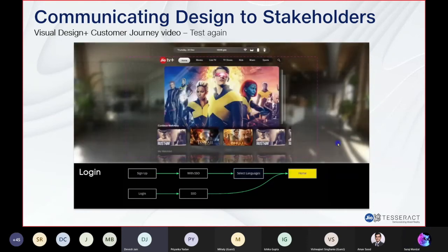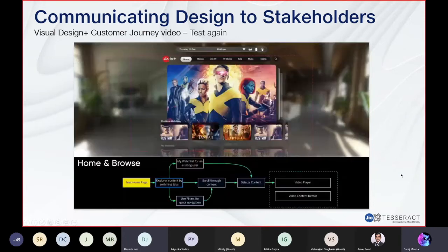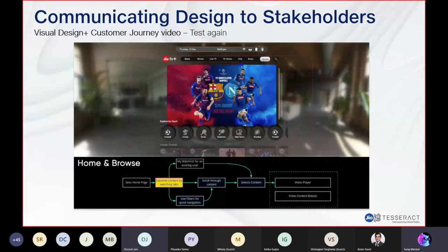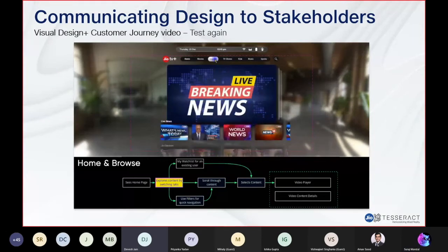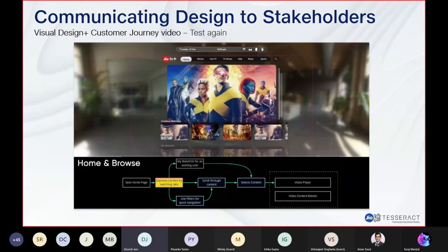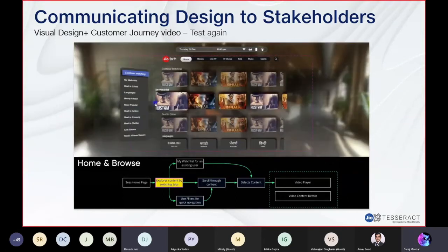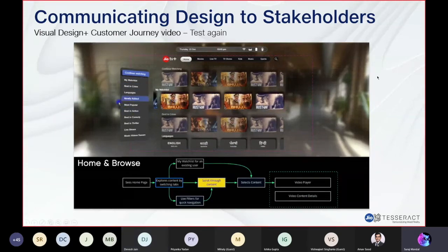In fact, this is the stage where we get the maximum amount of feedback to refine some steps that we may have taken in the wrong manner, or something that can be improved. This helps to save a lot of time eventually, because once you start developing, making changes during development is obviously the slowest process. So that's where we spend most of our time, in getting feedback. And this is also the easiest format to share with any stakeholder.